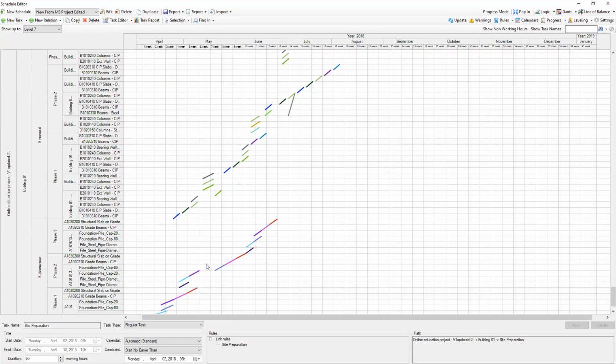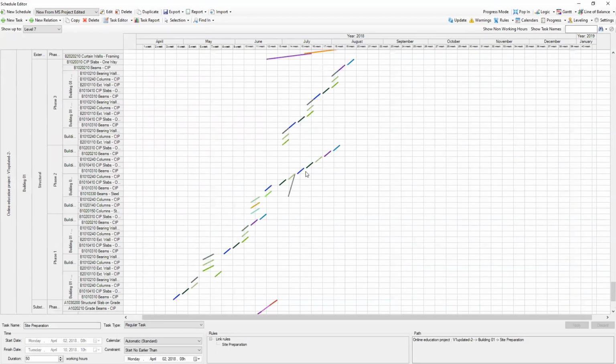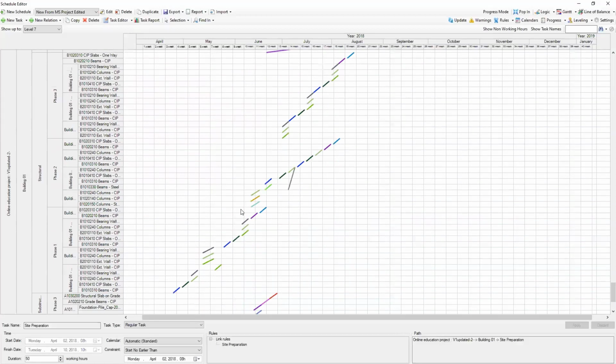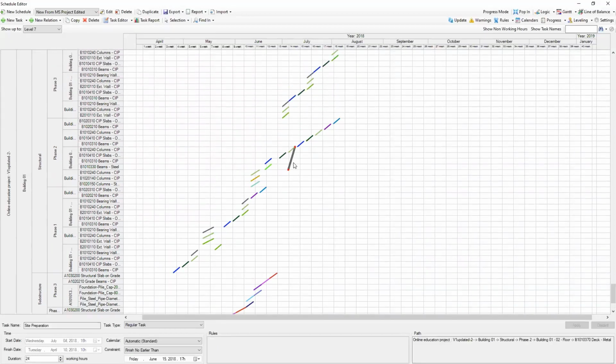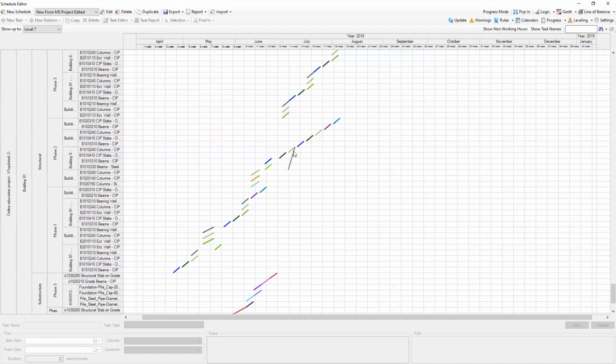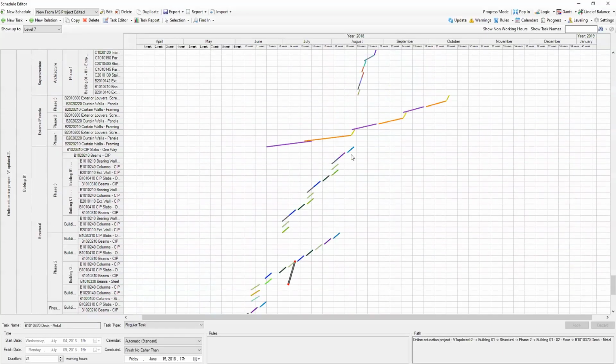And actually, here is the way where you can see if your activities and resources, if you have them, are optimized and organized in the most efficient way. So in this case, you see that some of the activities are actually executing at the same time where some other activity is executing. And then you have to check if these are using the same resources or not.